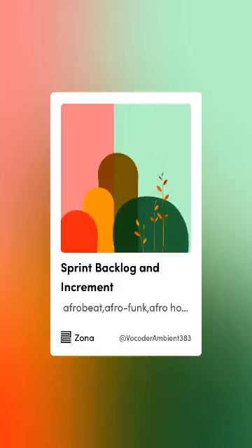Sprint goal. The sprint goal is the single objective for the sprint. Although the sprint goal is a commitment by the developers, it provides flexibility in terms of the exact work needed to achieve it. The sprint goal also creates coherence and focus, encouraging the Scrum team to work together rather than on separate initiatives.